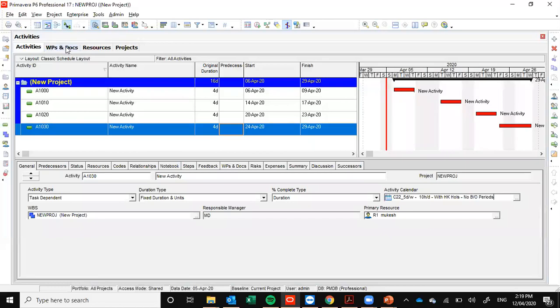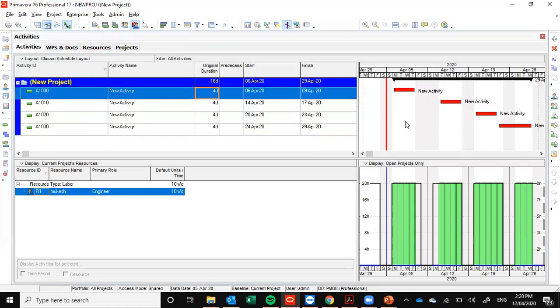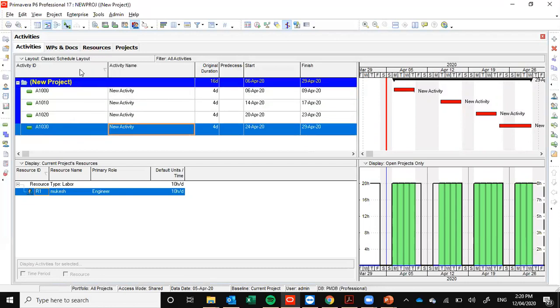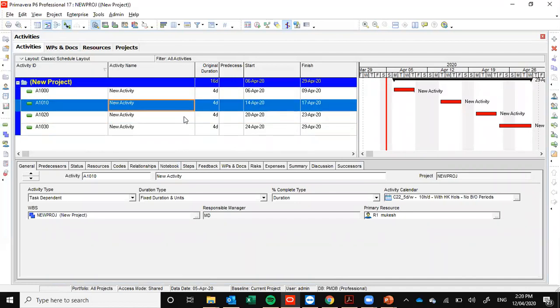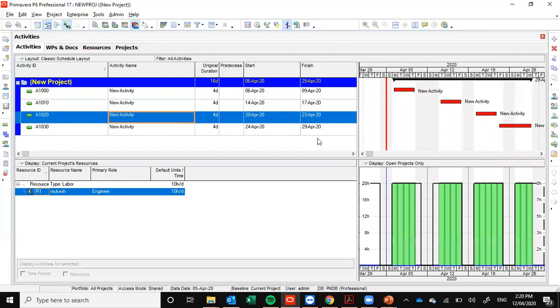From this Gantt chart, you can also analyze how things are being used here. I think the duration taken for the activities is 4 days, and that's why it is doing that. But again, we haven't given the relationship. That's why it's happening. Actually, the project calendar we have used is 5 days, but because we didn't have a relationship in that, that's why it looks like that. No matter what, it will show you that you have to spend 16 days to complete this entire activity with a single resource. So basically, it's a resource leveling technique, automatic leveling.